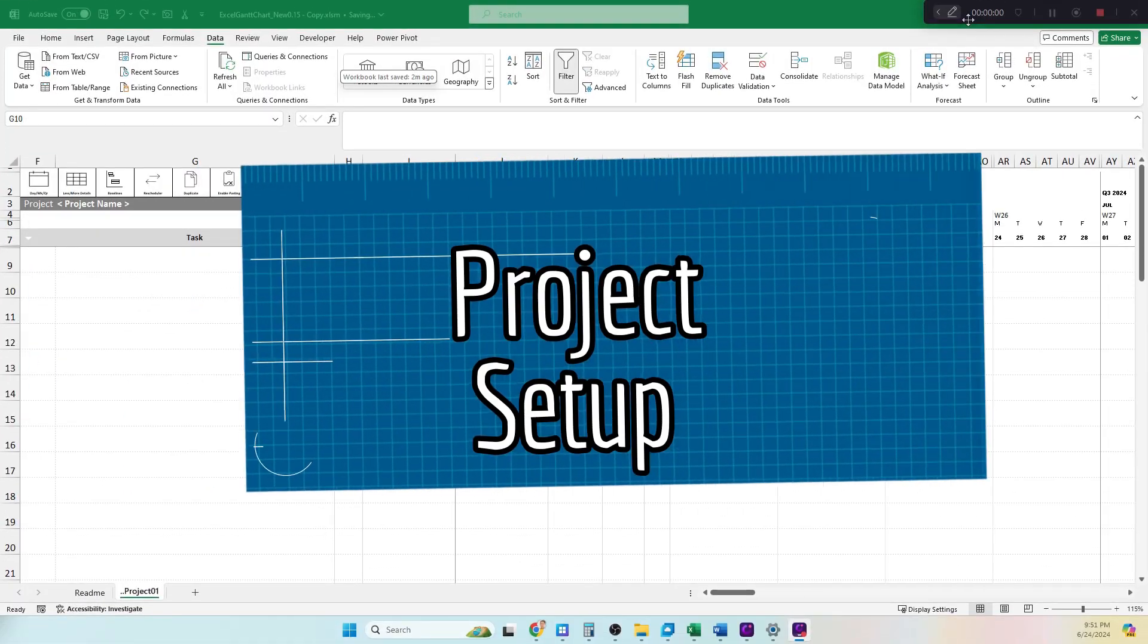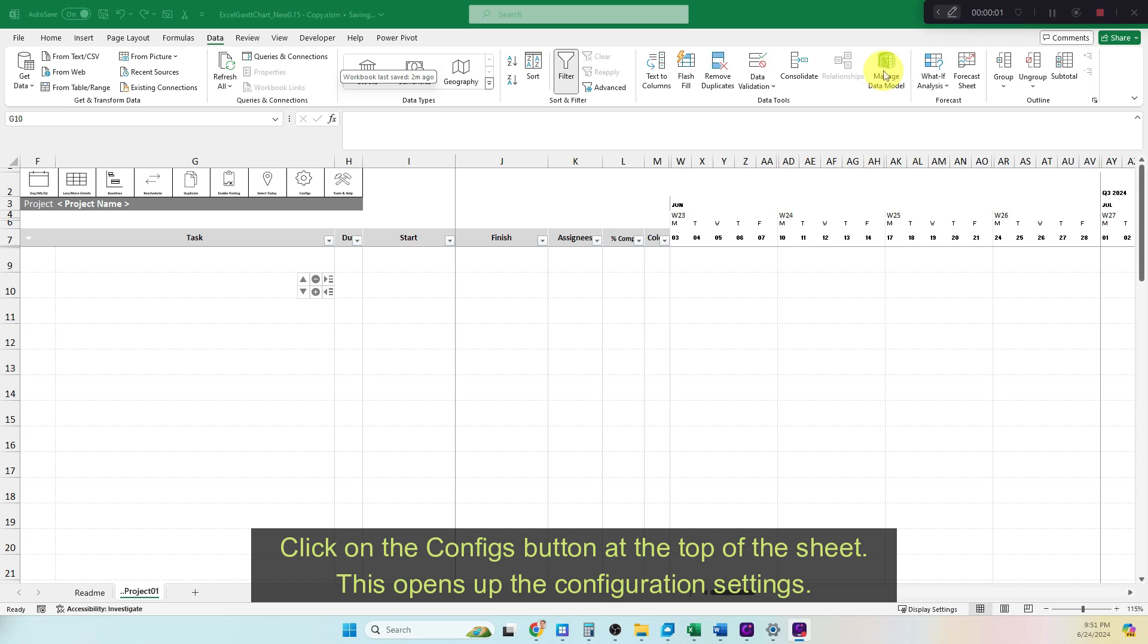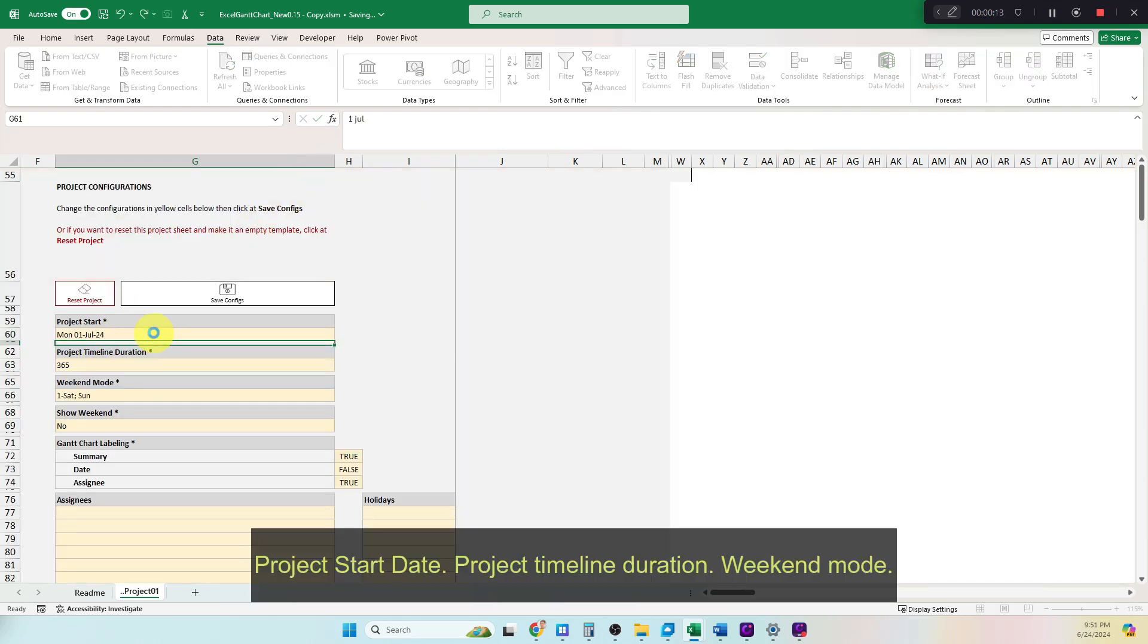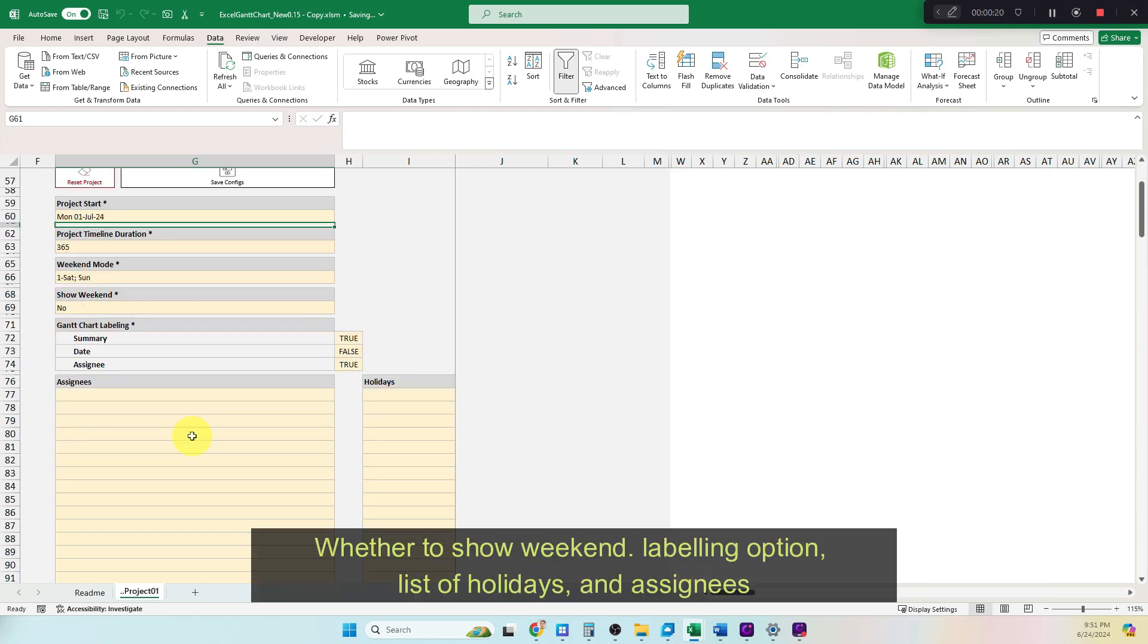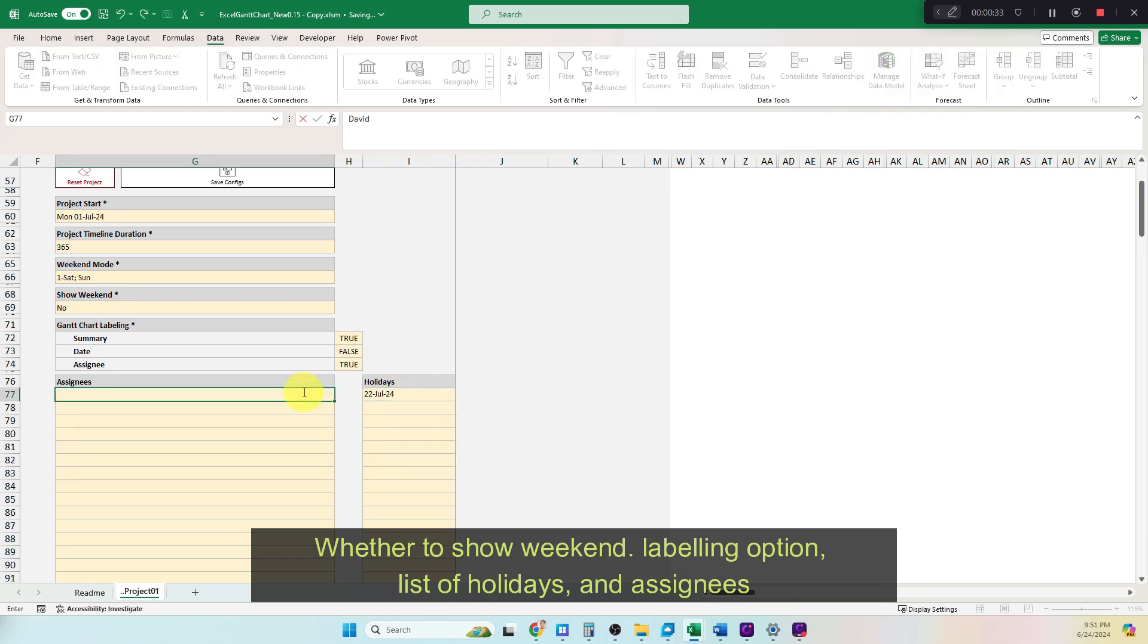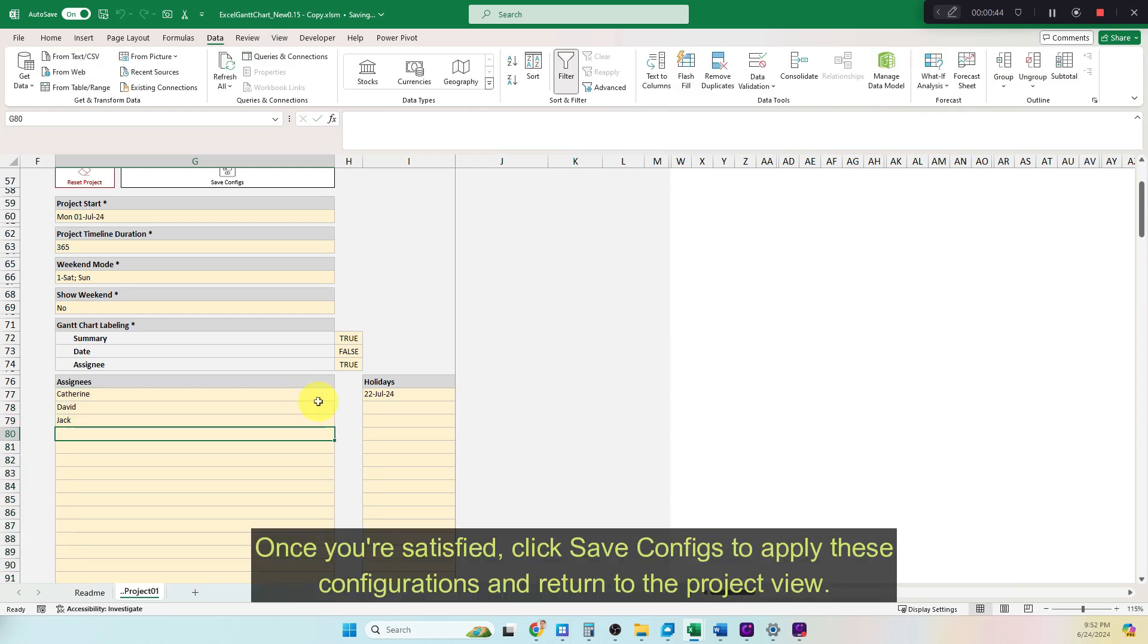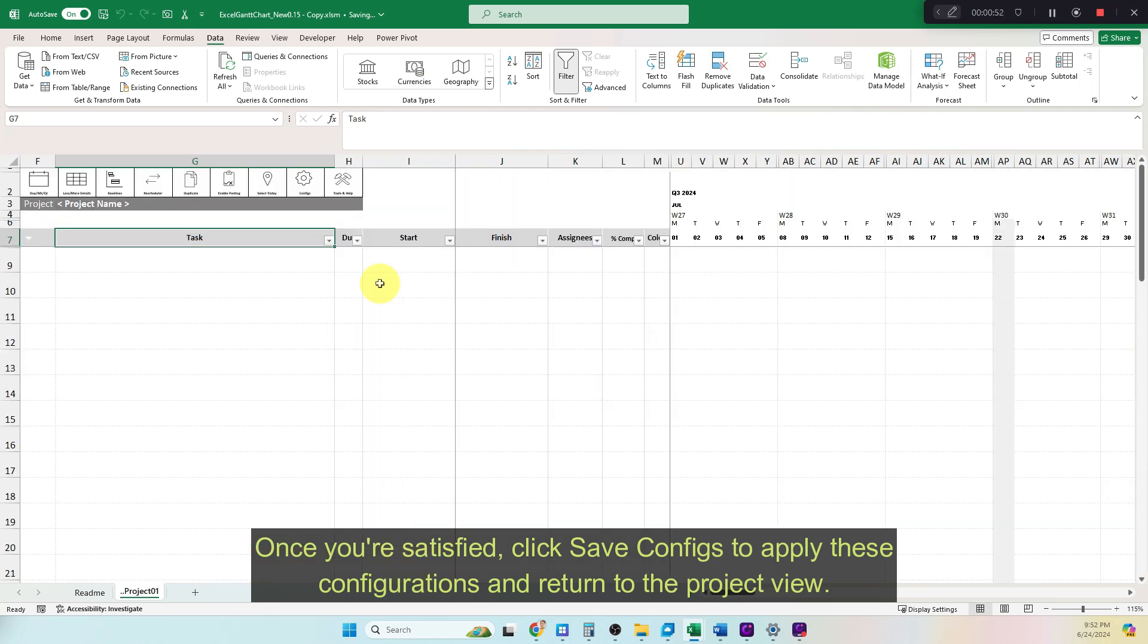Project Setup. Click on the Configs button at the top of the sheet. This opens up the configuration settings. Review and update values of project configurations, including Project Start Date, Project Timeline Duration, Weekend Mode, whether to Show Weekend, Labeling Option, List of Holidays, and Assignees. Once you're satisfied, click Save configs to apply these configurations and return to the project view.